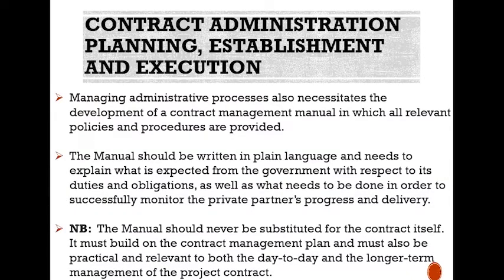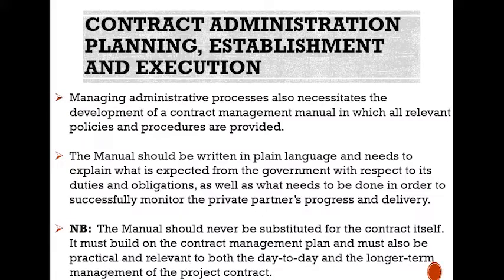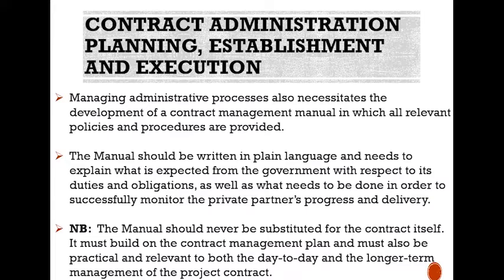Managing administrative processes also necessitates the development of a contract management manual in which all relevant policies and procedures are provided. The manual should be written in plain language and needs to explain what is expected from the government with respect to its duties and obligations, as well as what needs to be done in order to successfully monitor the private partner's progress and delivery. Note: the manual should never be substituted for the contract itself. It must build on the contract management plan and must also be practical and relevant to both the day-to-day and the longer-term management of the project contracts.